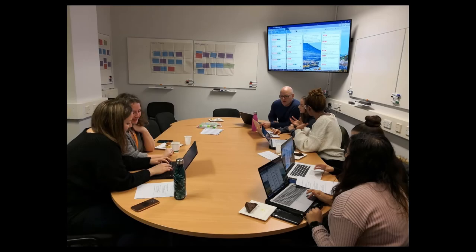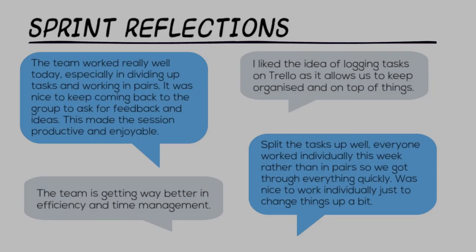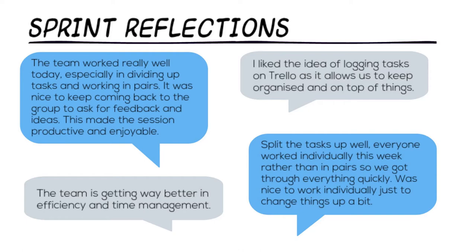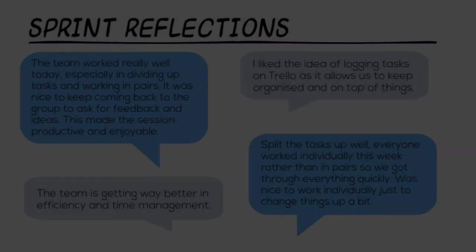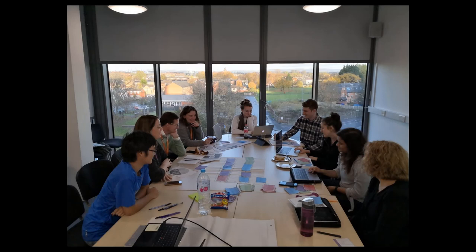At the end of each sprint, the team reflected on the process and they were asked two questions: what went well, and what didn't go so well? This was captured in the Airtable form and allowed us to reflect on the sprint as a team and then create sprint actions for the following week to improve the process. This contributed to an iterative increase in productivity and transparency, seen through the sprint reflections and sprint actions.